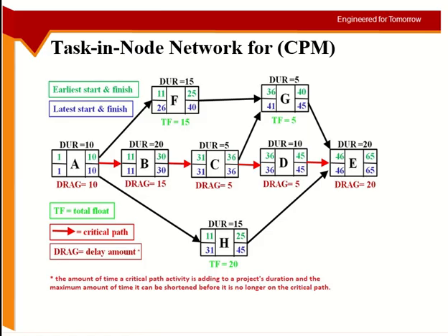Same thing, I'm jumping to activity A now, so you will keep on moving backward, and the same thing will happen at activity A. I'm getting 25 from here, I'm getting 10 from here, I'm getting 30 from here. If I select 30, I'm violating this dependency, and I'm also violating this dependency as well, because this activity has to start after 30.